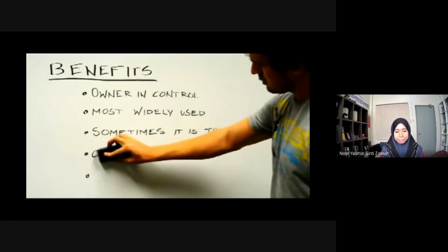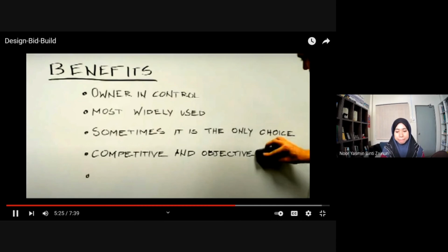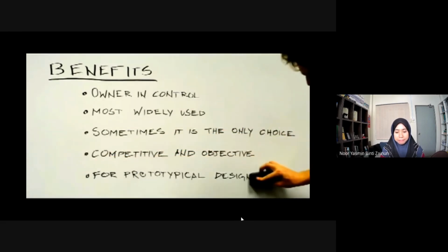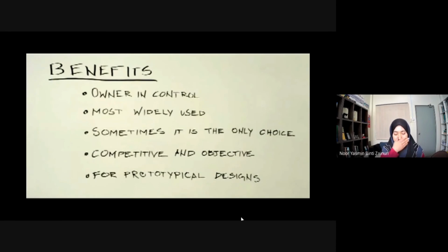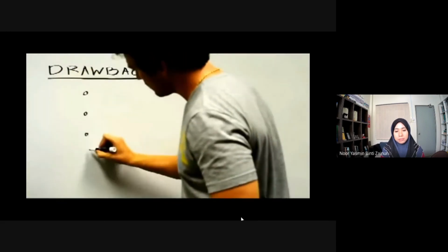It encourages competitiveness where contractors are asked to place the lowest bid based on plans and specifications, and fosters objectivity where a contractor is chosen because his expertise allows him to work more efficiently and therefore to bid at a lower price. It suits owners that build buildings based on prototypical designs improved by iteration, such as schools, retail stores, and food chains. As long as the number of such owners is increasing, so will the use of the design bid build method.